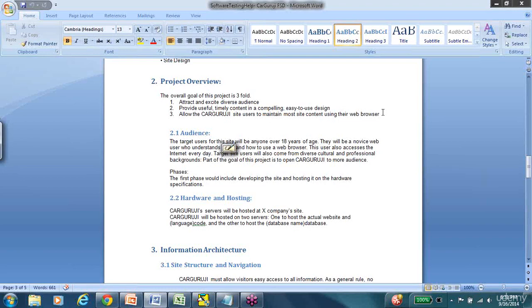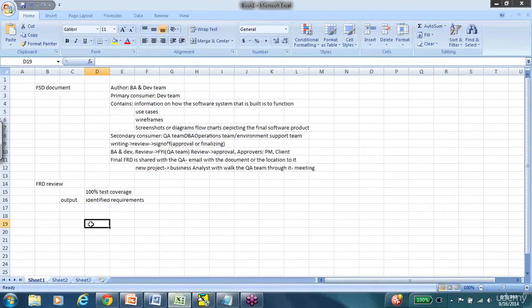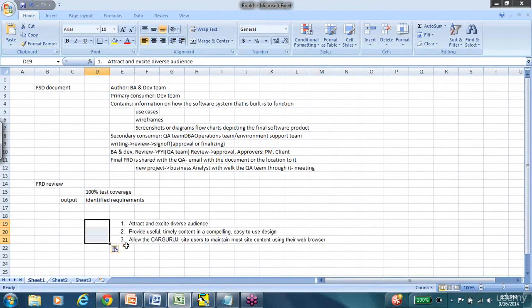So now that we know that these are business requirements, let's perform a little bit of a feasibility analysis. Requirements, whether business, technical, or functional, all of them fall into our arena, and we have to definitely take them into consideration. But before we do that, we do a little bit of a feasibility analysis. For testers, the feasibility analysis factor is pretty simple: testable or not. That's the decision we are trying to make here.